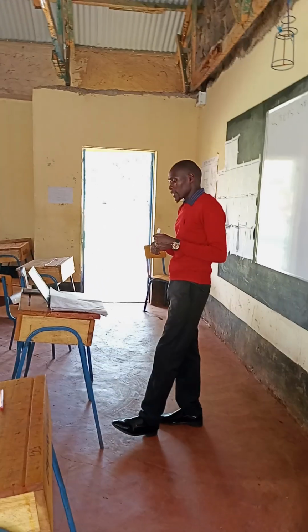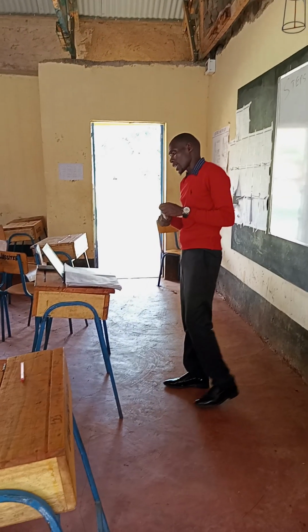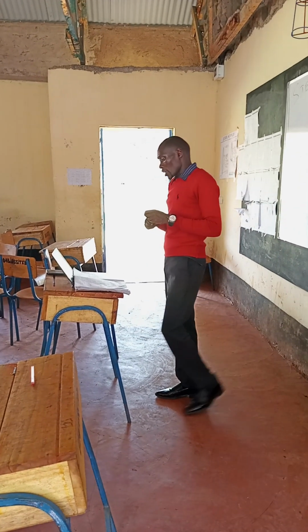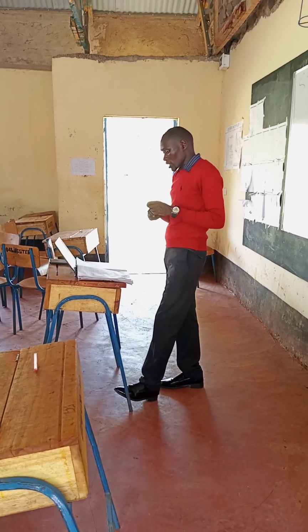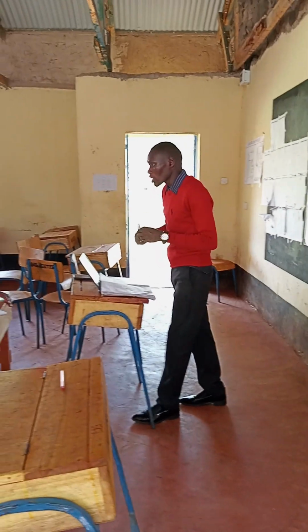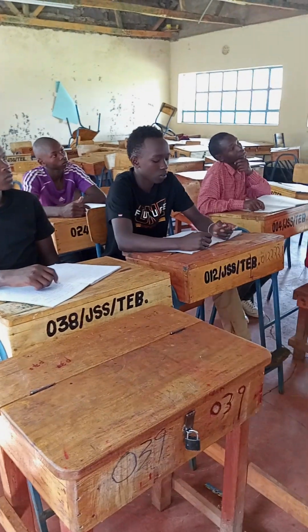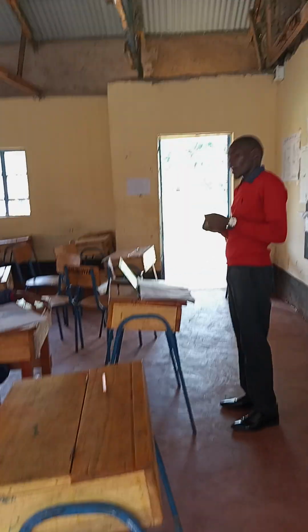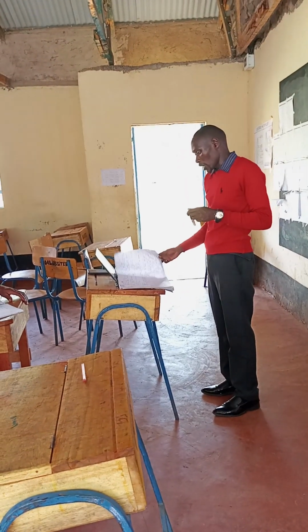The ninth step is panel fixing, whereby you should know to secure switches, sockets, and light fittings, label circuits, breakers, and DP. The tenth step is power up and commissioning. That is the final step, whereby you energize the system. After installing all these materials, you have to energize to know whether you have done the correct thing. And that is the steps of doing installation of electrical in a house.